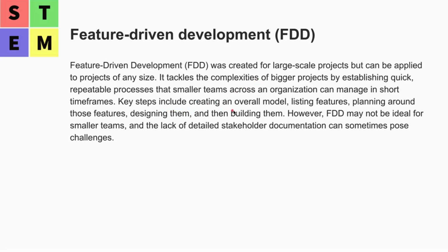Key steps include creating an overall model and then listing features, right? And planning around those features. So it really breaks the bigger project into small features, and plans around them, designs the features and builds the features. So it concentrates on the features. Okay.